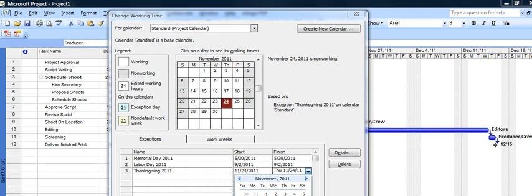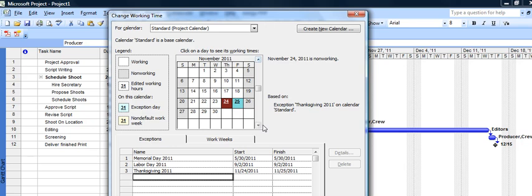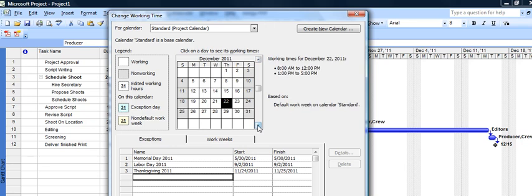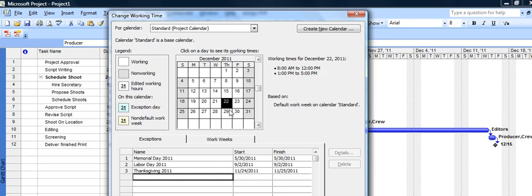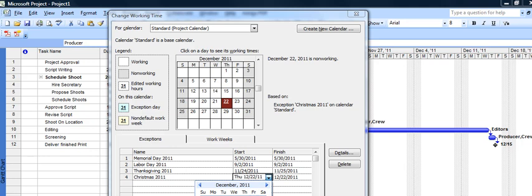And we're all set on that. Let's also take care of Christmas and New Year's at the same time. Now December, Christmas hits on a weekend this year, but let's say our company is particularly generous and we'll give the Monday holiday with it. So we'll put in Christmas 2011 and we'll let them have off on the 26th of December.